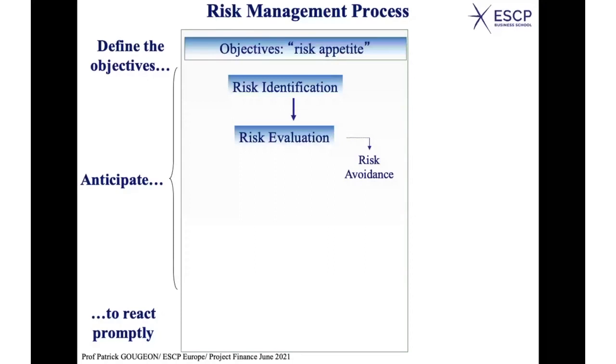In this case, you would immediately reject the project, say, no, it's too risky, we are not going to do that. For instance, if you consider investing in a particular country, and you realize that the political risk is really too high in this country, you may just decide not to go further and postpone the project or decide not to go for it, okay?